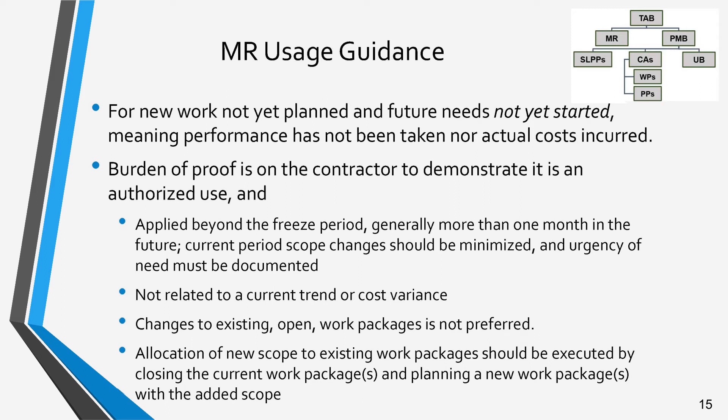This is generally more than one month in the future. Current period scope changes should be minimized and any urgency of need must be documented. If the MR budget allocation impacts an active existing work package or set of work packages, it is preferred that those affected work packages are closed and replanned with the additional scope and budget in new work packages.